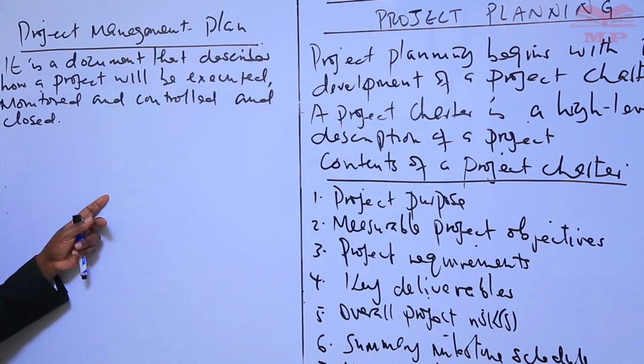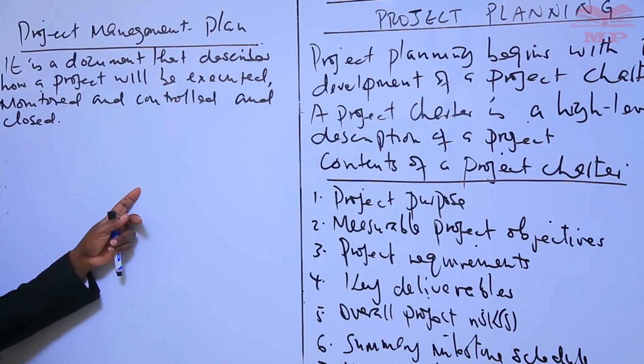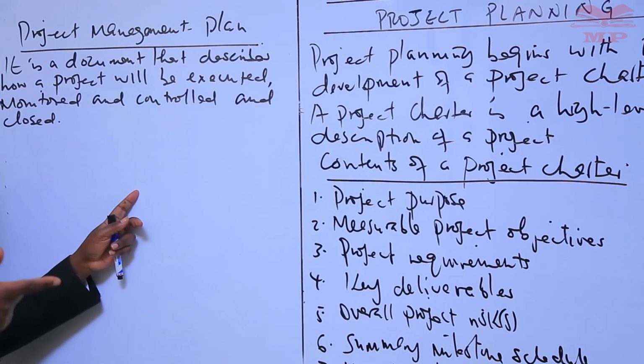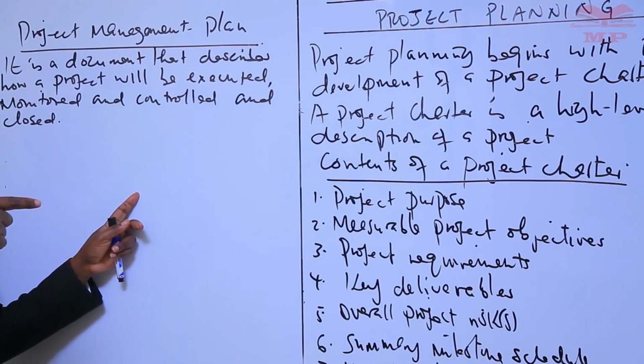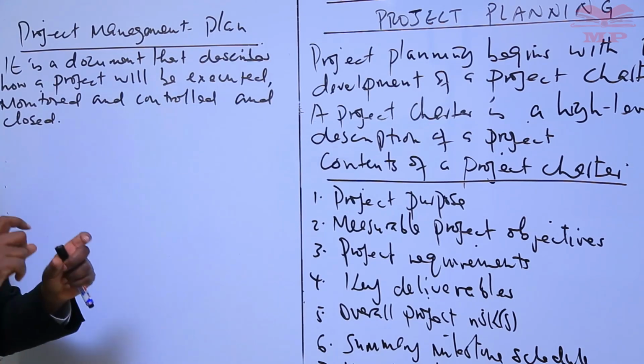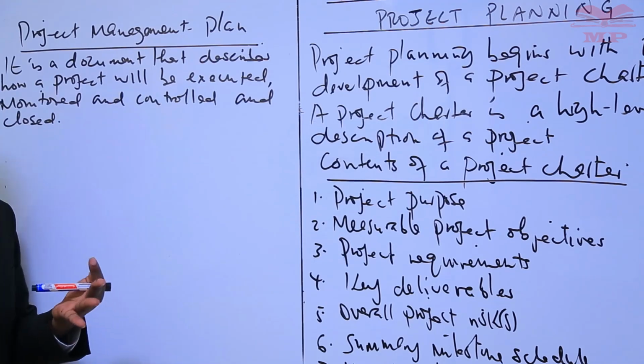The project management plan should also be baselined. That is to mean it is necessary to define at least the project references for scope, time, and cost. Why? So that the project execution can be measured and compared to those references and performance, and that performance can be managed. So it has to be baselined in terms of the cost, the time, and also the scope.